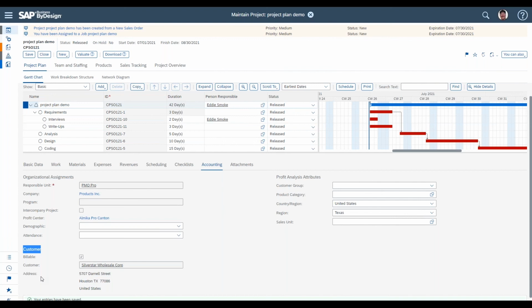When those actuals are done, project invoicing leverages information on the sales order to produce the invoice. So when you're using that type of project where a sales order and a project are linked together, those customer reference numbers, like a PO number or an AFE number, an authorization for expenditure, get defined on the sales order. Then when project invoicing runs, it'll pick those up and push them all the way through to invoicing.